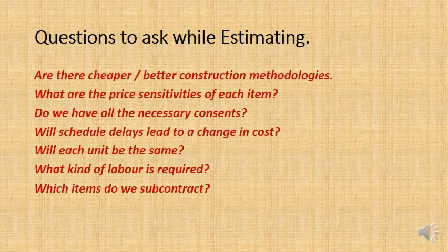In which case the risks and the costs will go down, because we're basically engaging in a little bit of production management, aren't we, as opposed to project management. And so that can actually reduce risk, and it can save time. The cost and the time to build the final house will be less than the cost and time to build the first house, for example.